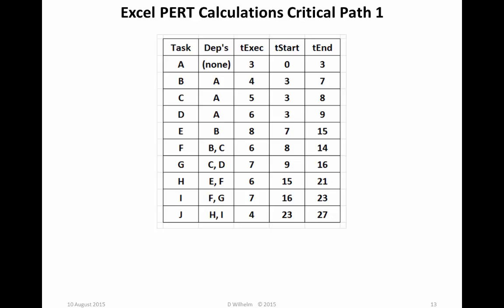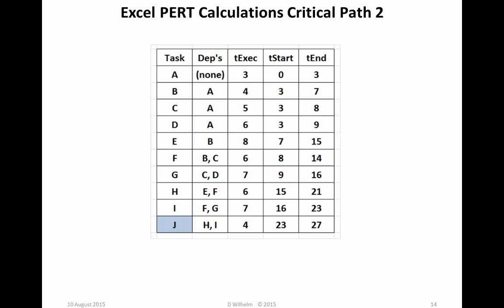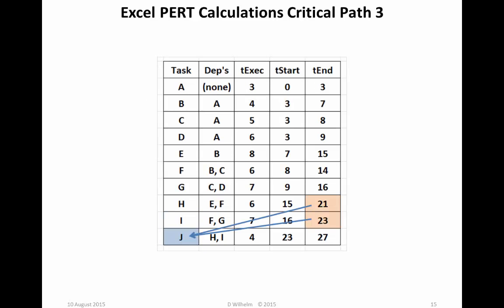The next step is to determine the critical path. Unfortunately, there's no way to do this automatically as we did with the cumulative elapsed time, but neither is it that bad. Task J is on the critical path. There are no parallel tasks. It is the final task. So J is on the critical path. What delays task J? Well, we see its dependencies are tasks H and I. Task H ends at 21. Task I ends at 23. So task I is the one on the critical path.